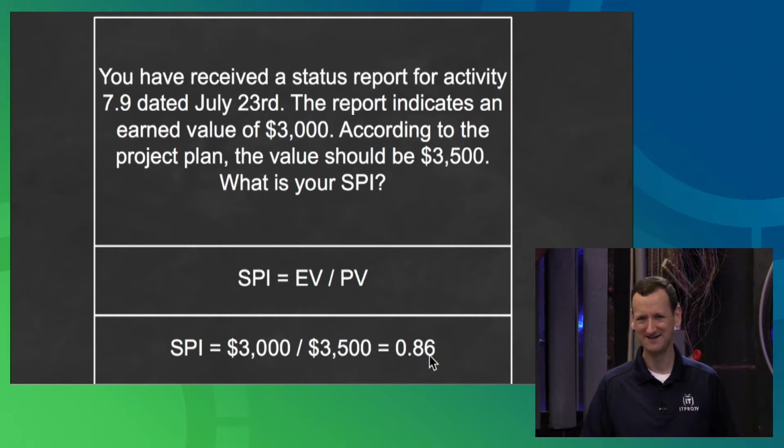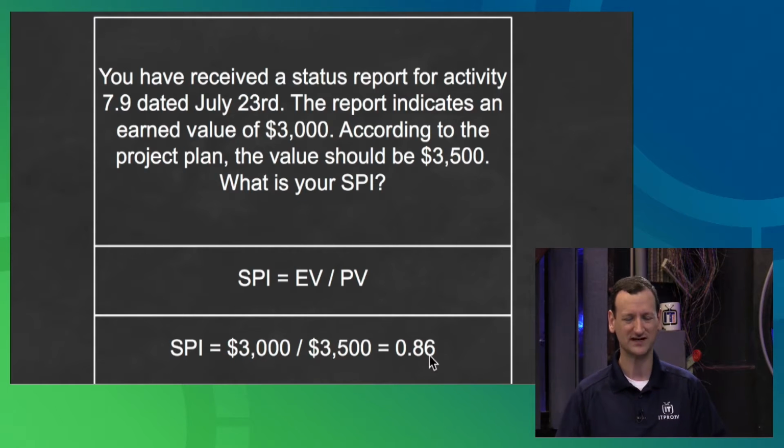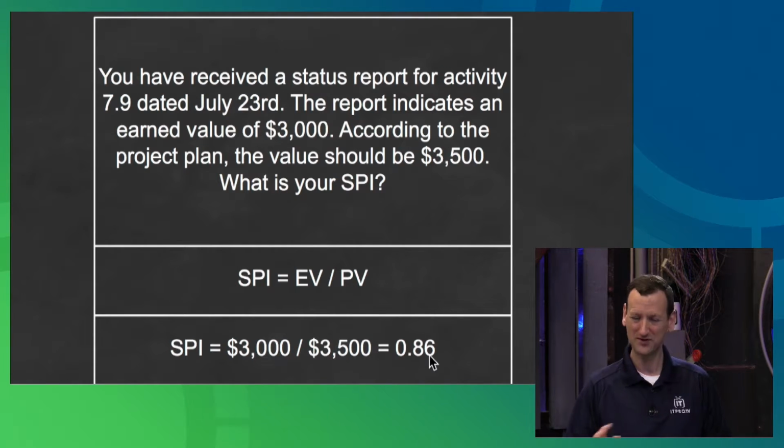Okay, now how bad is that? Is that really bad? Not really. I'm just 14% behind. I can probably make that up. I probably have resources I can apply to really get that corrected. Versus if I was 70% behind. That's pretty bad, and we're definitely going to need to deal with that. This takes the size of the project out of the mix.